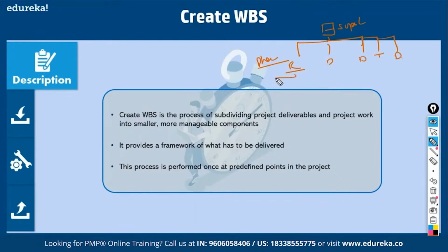Then from each phase, you define the major deliverables. For example, requirement documentation is a major deliverable. Requirement documentation for what? Well, the Reuters interface, the Bloomberg interface, the interest rate interface, all the requirement documents. So you define, and you come to the lowermost level, which is called a work package or deliverable. This is a process of decomposing work into the lowermost part, called a deliverable.